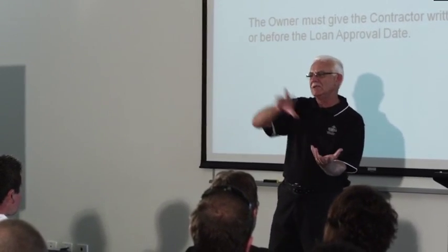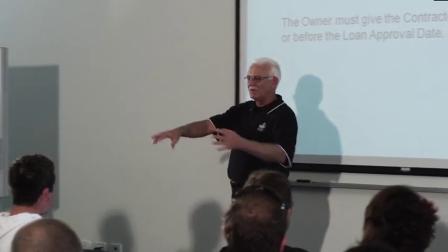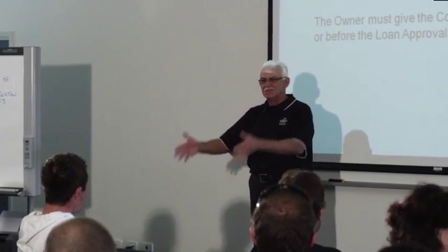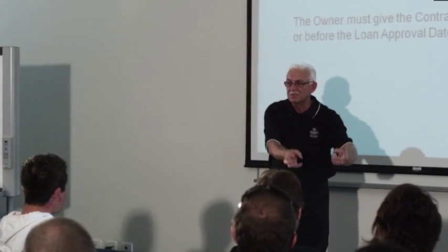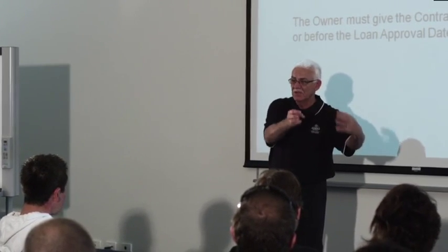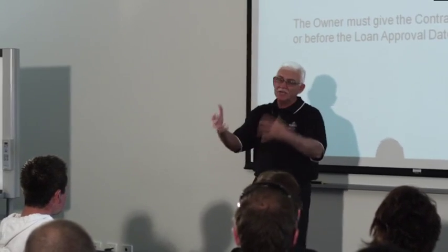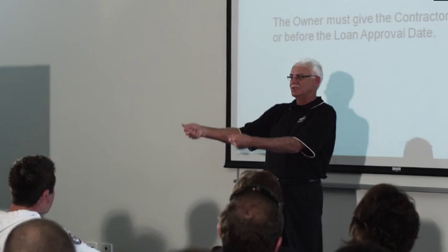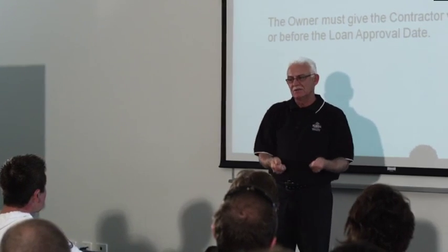So you know that when your customer comes back to you and says, oh look, I found this nice glossy white big tile and it's 900 by 900, well that's not in accordance with what I've actually quoted in the specification. So you're going to have to charge, and you'll get your tiler to give you a price. Okay, tiler, the owner's chosen these tiles. How much is it going to cost to lay that?